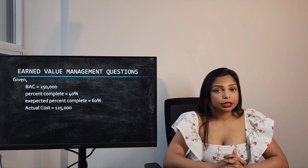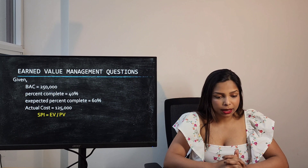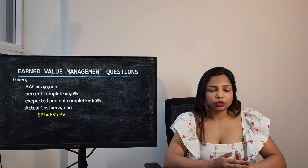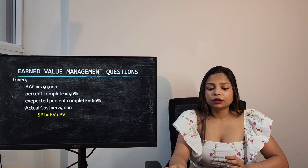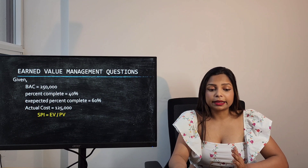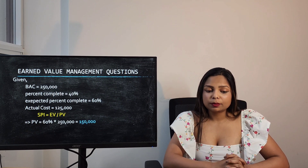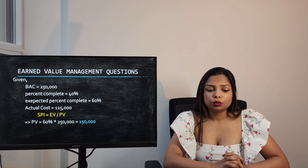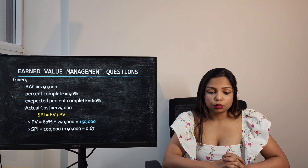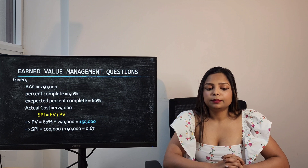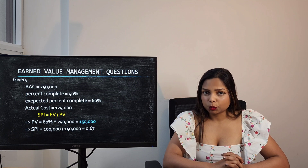To calculate the Schedule Performance Index, the formula is Earned Value divided by Planned Value. Earned Value is already calculated as $100,000. Planned Value is 60% multiplied by $250,000, which equals $150,000. Dividing $100,000 by $150,000 gives an SPI of 0.67.